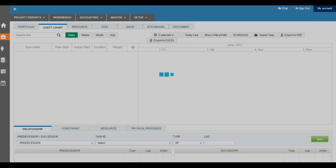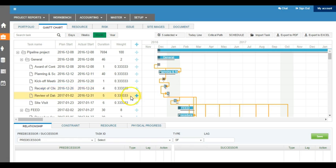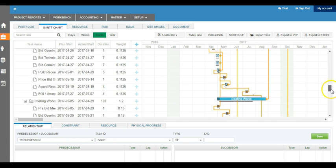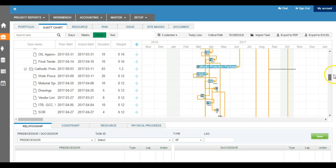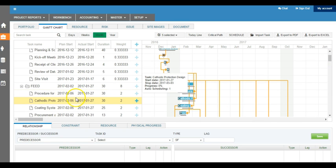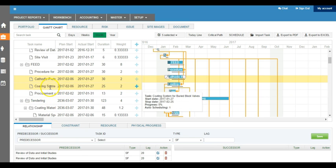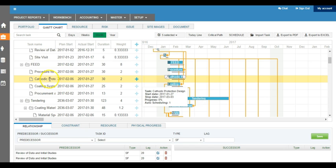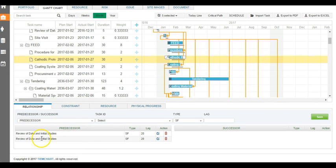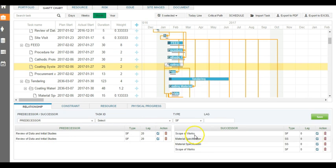To get the details about the project, this Gantt chart can handle quite complex projects where tasks have many dependencies. When I say dependencies, it means the relationship of one task to the other. You can see those dependencies whenever you click any task. You can see the relationship underneath, which is the predecessor of this task and if there is any successor, what is the successor of this task.